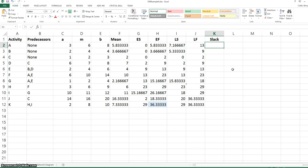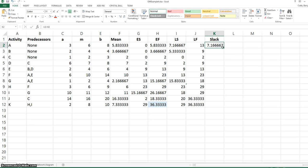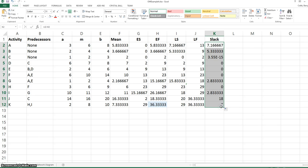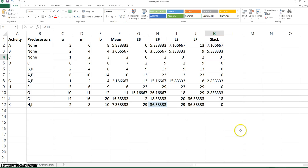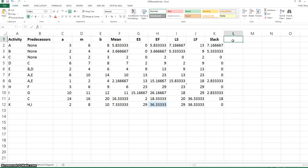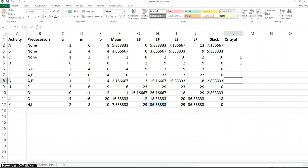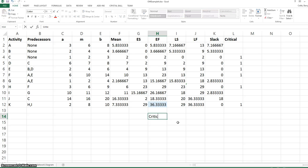The slack time is the late finish time minus the early finish time for each activity. The critical activities are those that have zero slack, so we can mark with a 1 the critical activities in column L of the worksheet. The critical path is C, D, E, F, H, K.